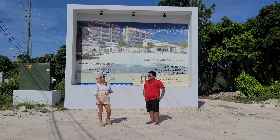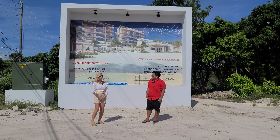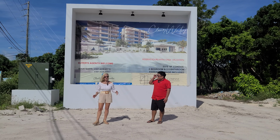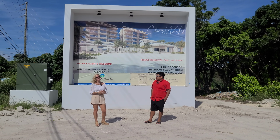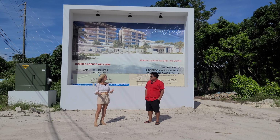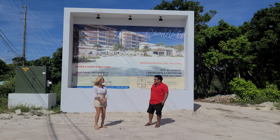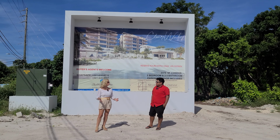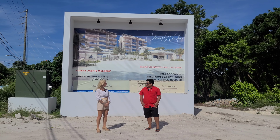Okay, great. So give us a bit of a completion date. You guys have gone up pretty quickly. I see a lot of progress on it, but give us an approximate completion date. Sure. On paper, the anticipated completion date is December 23. We do anticipate it being completed well before that. But in light of all the supply chain issues that the whole world is facing, we decided to cushion the printed date to December of 23. But it's likely to finish more around July. Okay, that makes sense. But there is a nice cushion there for people to be aware of.